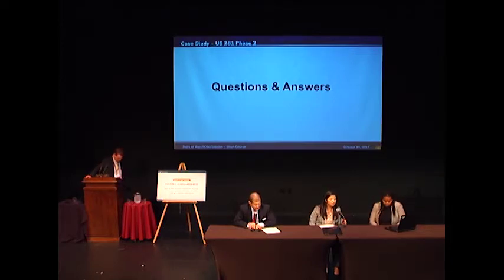So we do give the utility company the option. If they're in the right-of-way and they want to go into an easement, one of the things with that is that the utility company won't be able to joint bid the construction, so that's the risk that they will have to clear prior to letting. So they have to go through acquiring the new easement or the replacement easements. So depending on the project and the schedule, that is an option that they could have.